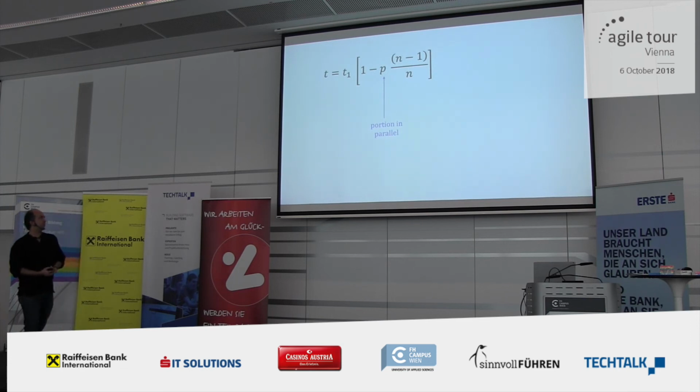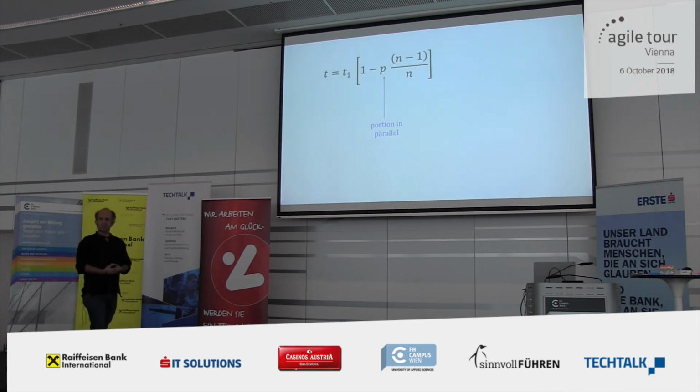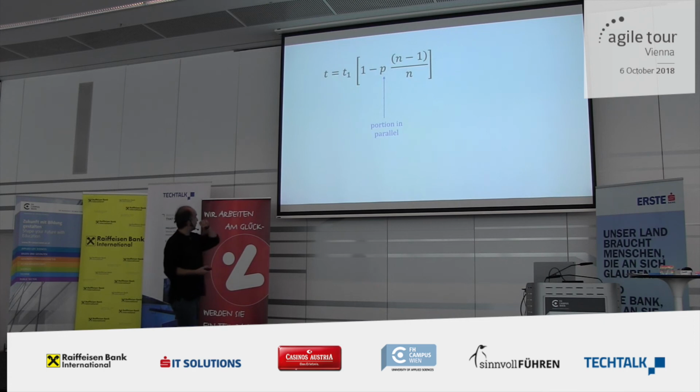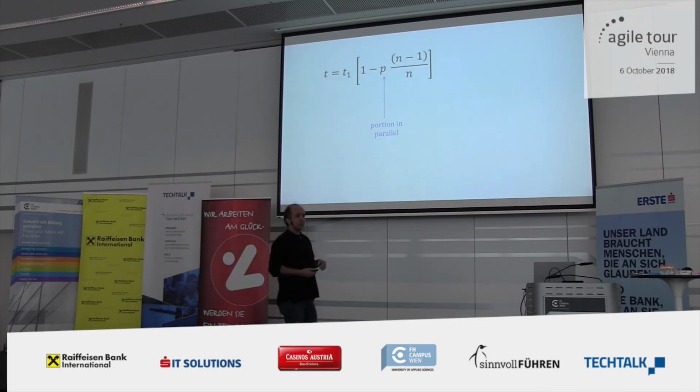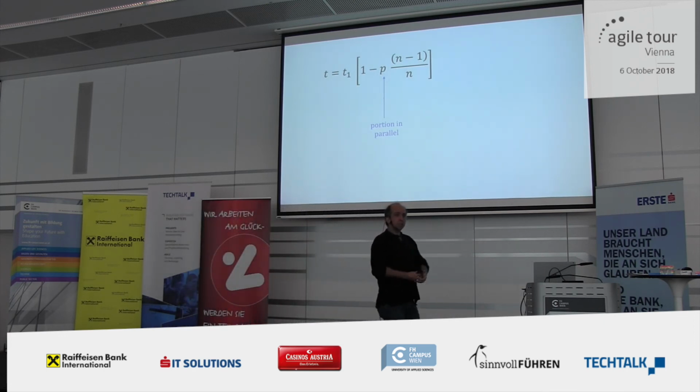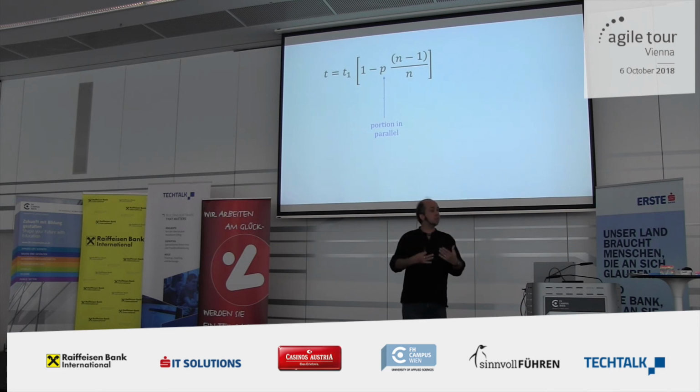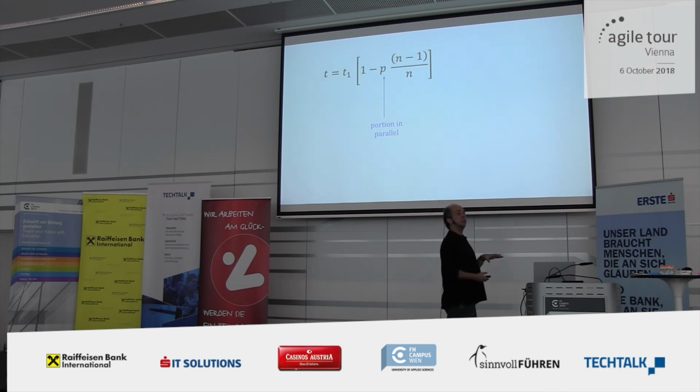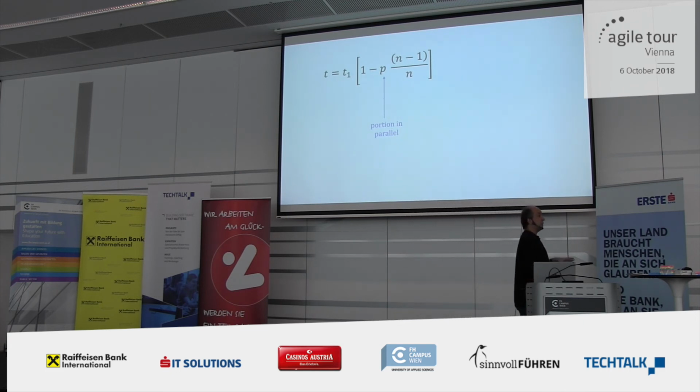Yeah, so it turns out the lean guys were right. This kind of idea of waiting states and work in progress, these things matter. If you're waiting on everybody, everybody's waiting on you. I think the shape of your process causes these intermediate states. You're not able to flow. There's a lot of stop-start, then you can reduce the effective concurrency of all of these people so that everybody behaves as if there's actually not n people.